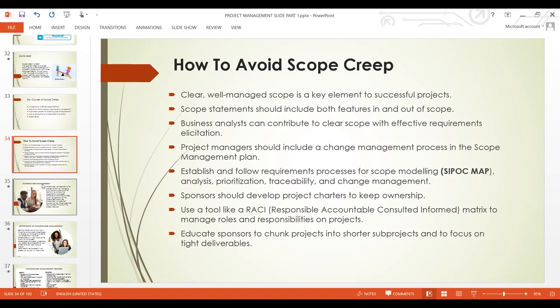You know, I've managed a project where I was delivering a learning management system and a booking management system as one project, but it shouldn't be. These are two different projects. And I advised my sponsor, no, these are too big. Let us break this project into two. Although you are planning to integrate these two products together, you can do that after developing them as independent projects. The two of them can work together, but it cannot be one project because it's too big.